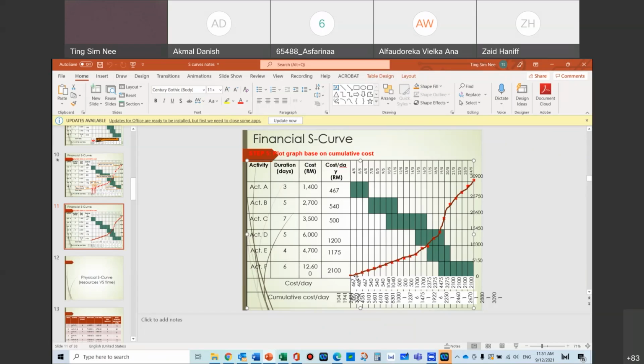in and out, meaning that I will actually look at month 1, based on your budget, how much will you be spending? So you will look at your budgeted cost of the work that you are planning to perform. That budget is different from this budget. You're looking at your expenses, okay? So then you have the PV for your client, then you have the PV for your own expenses, correct? Yeah. So from there, you can see the difference, okay? Usually it should be under. This is a contract sum, so yours should be underneath here somewhere.